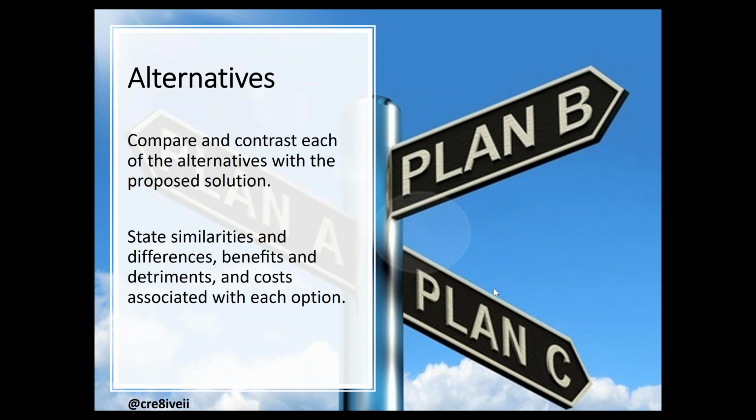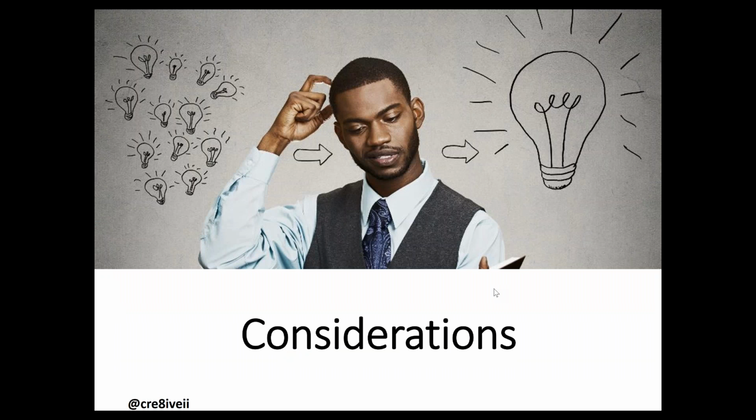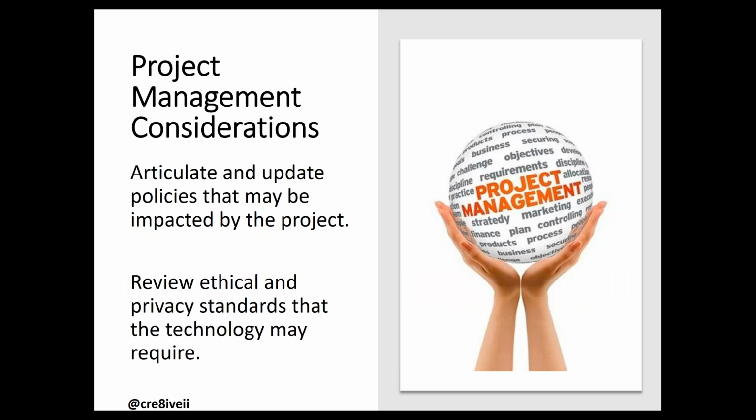So let's talk a little more about considerations. Project management considerations. Well, we talked a little bit about just putting together the plan, and another thing that I think is very specific to project management for mobile learning is to look at the policies that may be affected by the project. The reason I say that is when we first started developing learning for mobile, the same policies that we had used for desktop systems in corporations weren't being used for mobile devices. So there were some clear questions around what we could let people have access to, and from a security standpoint, how they were going to access that.